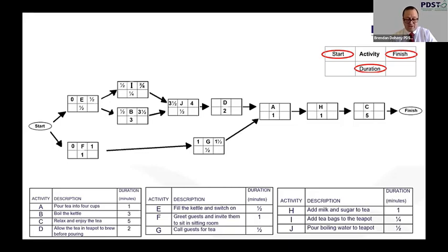We'd ask our class to complete the graph as best as they can, offering guidance as they progress if they need it. And for the rest of this slide, I'll continue with the anticipated response of students to complete the grids. We can see here that D follows J. So D will only start once J is complete. So D will start at 4, and 4 and 2, it'll finish at 6.